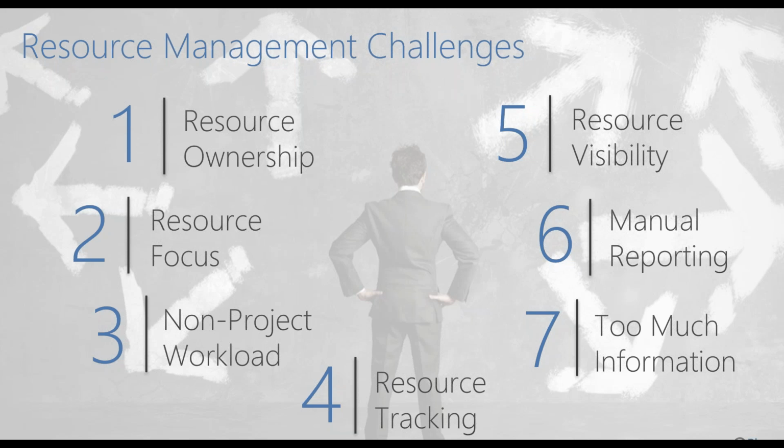And then non-project workload. A lot of folks allocate resources to projects as if they're 100% dedicated to their projects. That is generally a fallacy. Resources have other demands, whether it be administrative or organizational internal needs, or non-project workload like operational work, break fix and incidents and service requests. The idea is if we're not factoring in the proper workload that people are otherwise committed to outside of projects, it can really impact our delivery of projects according to the commitments that we're making.